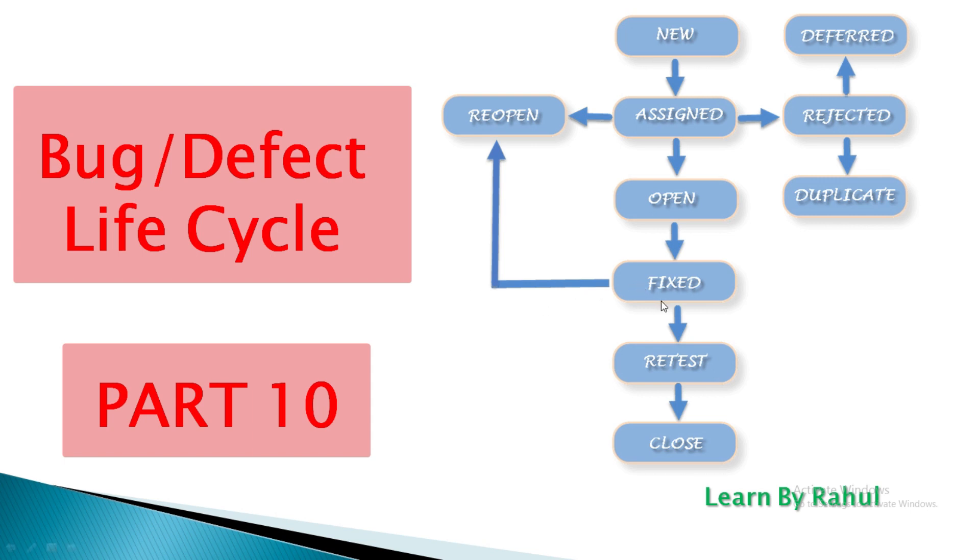If the bug is fixed, then the tester tests that particular defect and retests it to ensure it is working fine. The tester does the retesting at this stage to check whether the defect is fixed and changes the status to RETEST. After retesting, if there is no bug detected, the status is assigned as VERIFIED. If the bug persists even after the developer has fixed it, the tester changes the status to REOPEN.